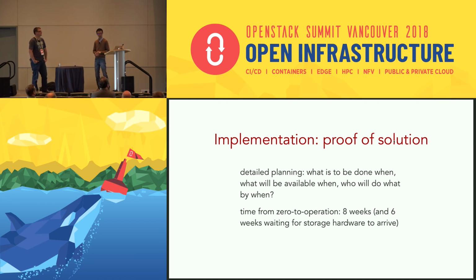Then, again, you go back to detailed planning, work out what's to be done, who's going to do it, and then the entire process planned out went from 0 to operation in approximately 8 weeks. 6 weeks of that was waiting for storage hardware to arrive.